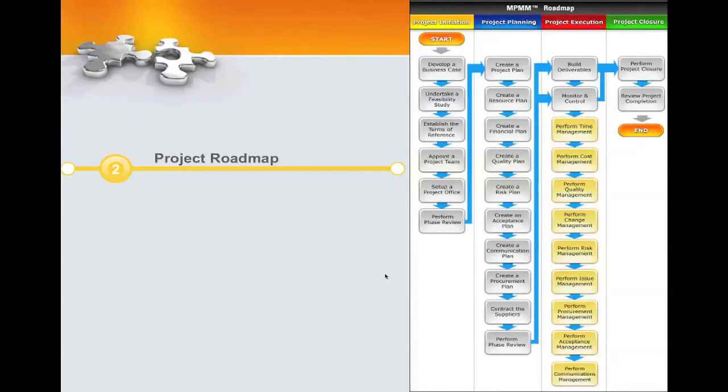So therefore, it's not considered a failed project, because everyone who is authorized to make those approvals and decisions has agreed that it's okay to extend the timeline. They've all agreed, accepted and approved to change the budget, so it's not deemed failed. Those are some of the tips, techniques and best practices so as not to have your project evaluated as a failed project at the end, which goes into project closure.